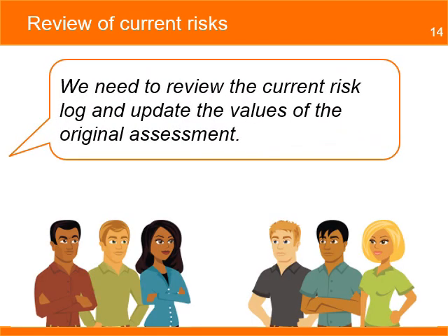During the meeting, you explain the need to review the current risk log and get new estimates for the residual risks. Those are the risks that are expected to remain after the planned response of a risk has been taken. The team agrees to review the 2 risks in the log and make updates on the levels of impact and probability for the residual risks.